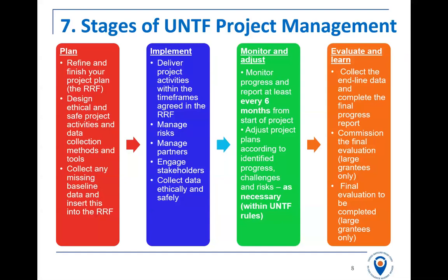And then over the 3 years, you will implement the project, you will deliver the results, manage your risks, manage your partners, and you will be asked to report to us every 6 months, and you'll have a month to complete that report. And you will have the opportunity to adjust your plans at least once a year within certain rules. And then after the 3 years, you will collect your final data, complete your final progress report.